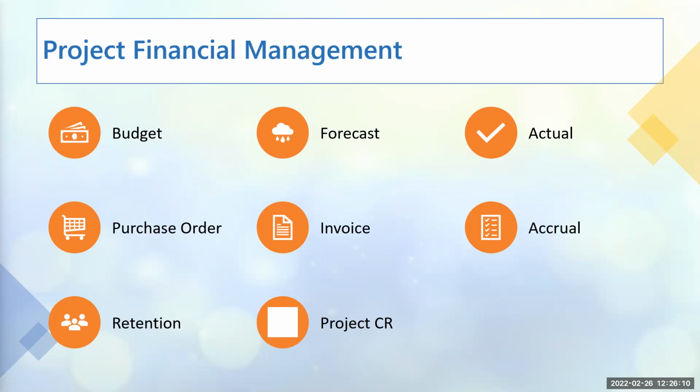At the initial stage, when the project is being set up, you tend to have something called a PID, the project initiation document, or in some environments it's called a statement of work. These detail the deliverables that are required to be delivered for the project. It also details the resources that are required, and the timeline that is required for that project.